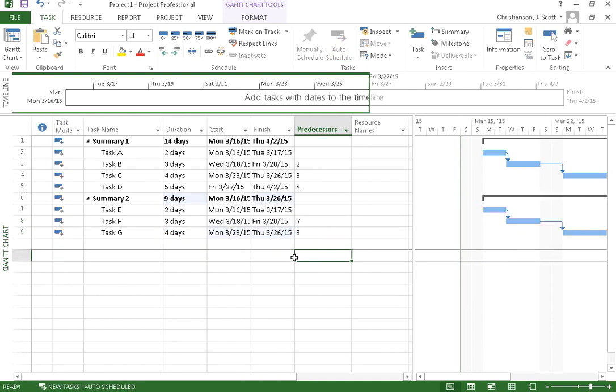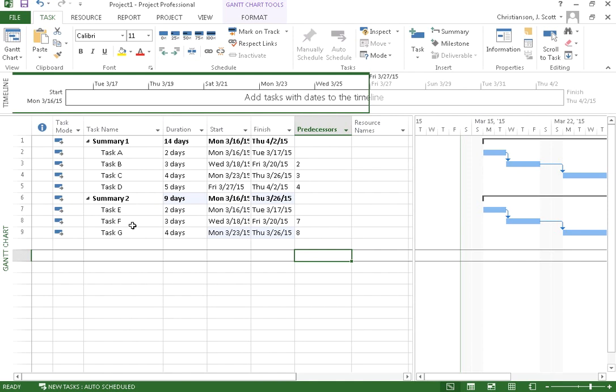This can be very useful because what we might want to do is we might want to not only help further organize our tasks, but also we might want to be able to look at, for example, how much does a certain subcomponent or subdeliverable of our project cost? And if we find that it may be fairly costly, we may ask ourselves, well, are we really the right people to do that? Should we perhaps subcontract that out instead?